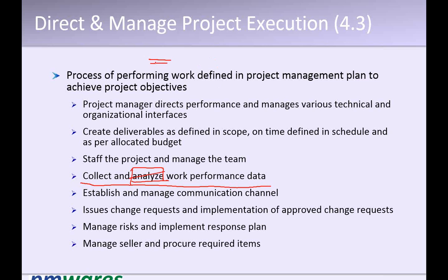You planned it here. Then you start executing it. Your deliverable is half done. At that time you do a review. So you did a review here and then implemented the review comments, etc., and kept producing it. Now it is produced, and you are again doing a review. Your deliverable is complete. This is part of execution and this is part of monitoring and control. So proactive checking is assurance and reactive checking is monitoring and control.